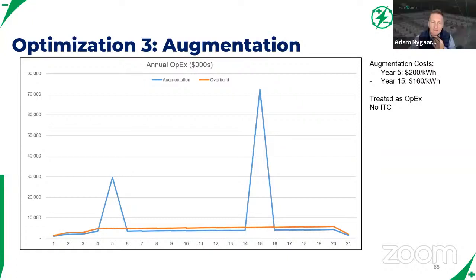Yeah. And Sherif went through that early on in the deck, right? But what isn't accounted for in that type of analysis, well, he did have the net present value, so net present value does take into account the time value of money. But the answer to the question is, you have to have a model that shows cash flows, both revenues and expenses over time, that can be dynamic such that when you make a change to size, it changes both CapEx and OpEx costs of those cash flows over time.